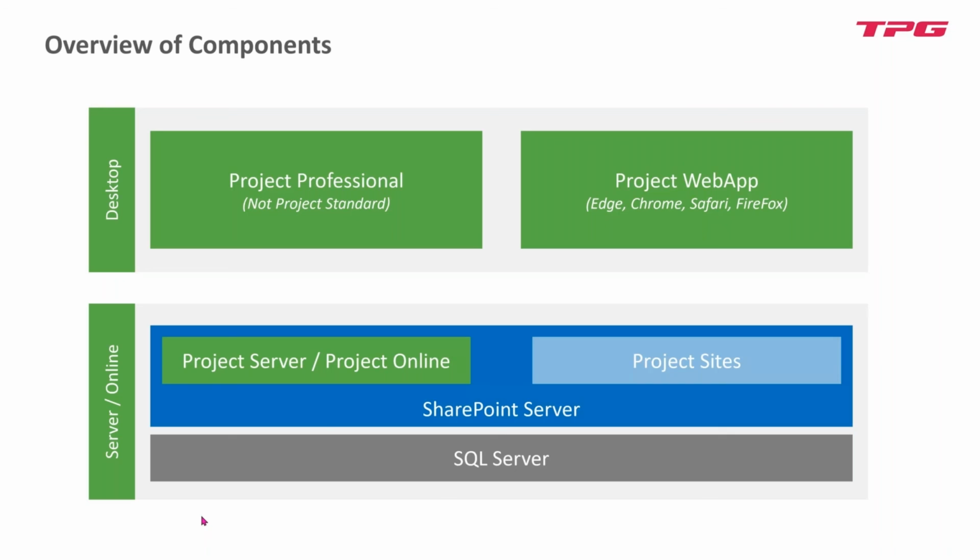But what Microsoft is not offering is that the Project Professional desktop application is working together with the new Project Premium or the Planner Premium. You can only import an MPP file once. So there is no way in and out like you know it from Project Online or Project Server. This is just not the case in the new world. But yeah, there are many options to decide. And now let's come to the end.